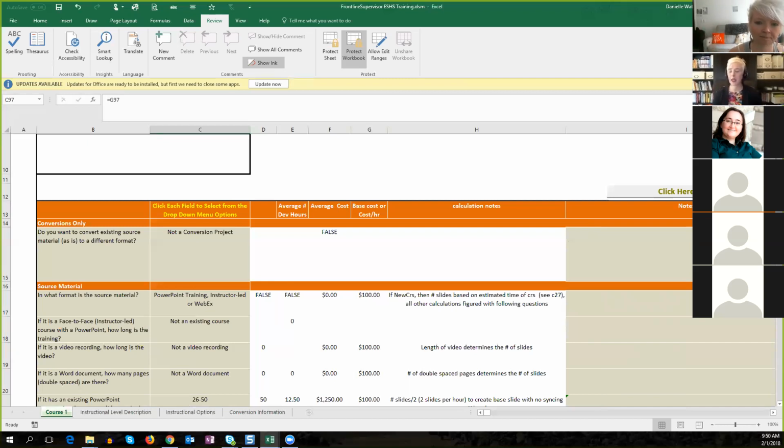Yeah, I hear you. Compatibility with cell phone delivery multiplier. Yes, Stephen, I would add that as a line item. We have not had that as a requirement for any projects for a while. They want them to be mobile ready, but they don't necessarily want testing done, because most people are going to be accessing it other ways. So we haven't added that as a line item on these couple of projects, but I would add it.